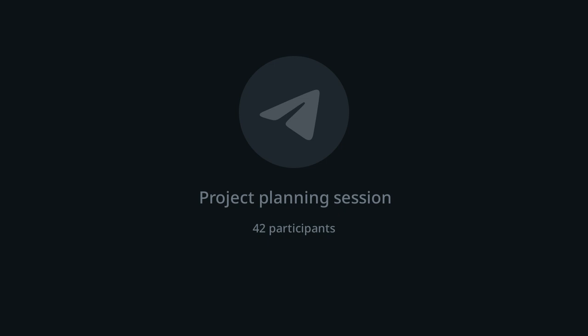So the instruction was to prioritize three features using MoSCoW, right? Now, I only want to see those three features on your roadmap. But this is not to say that these are the only activities that should be on your roadmap, because when you are building as a PM, there are other things. Won't you QA the product? Won't you sync with marketing to prepare launch materials? There are other activities that will happen in preparation for launching your MVP. Those activities, alongside the three features you've prioritized, should be on your roadmap.